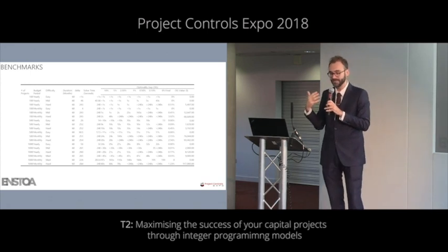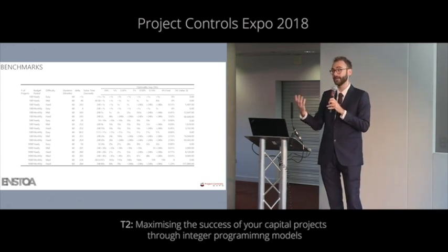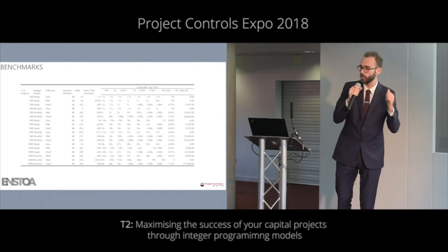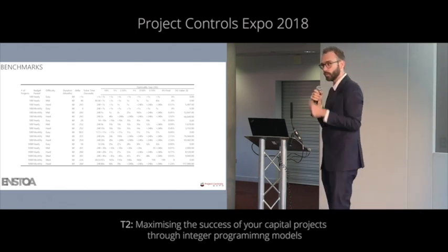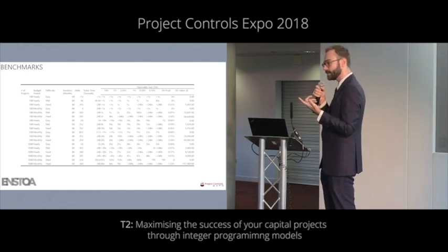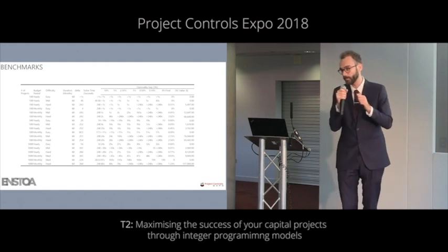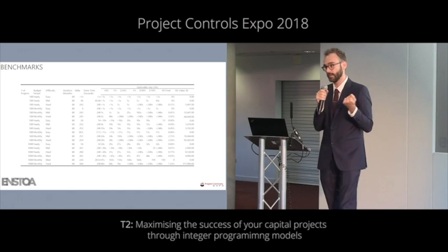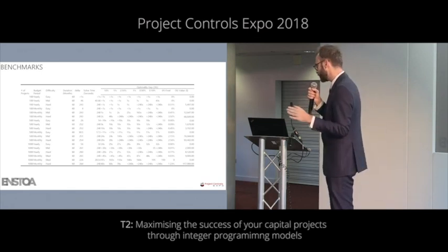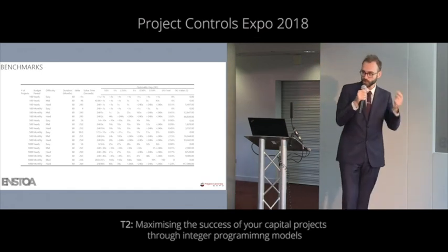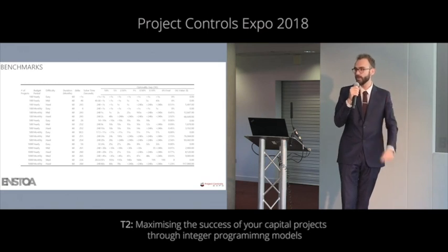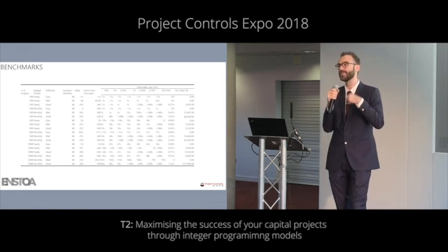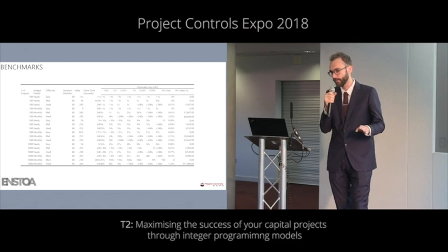If you define your budgets yearly, which is a slightly simpler model and I think a better model, you are almost always guaranteed a solution within 1%, often less than 1%, of the theoretical optimum. So not the practical feasible optimum, the theoretical optimum within 2 minutes. In almost all the examples I've solved, no matter the complexity, within 2 minutes, if you define budgets yearly, you are going to get a result that is within 1% of the theoretical most you could ever earn.